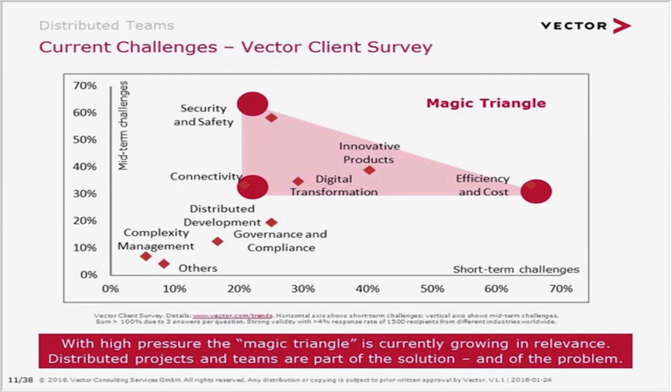Just to give you one number, which I think makes a lot of sense if we think about efficiency, is that typically a distributed team, which is on about 2 to 3 sites, has about 30% of additional cost, which is typically not visible. If it is visible, that's mostly in situations just before such a project crash. But there's overhead, and we should not close our eyes in front of that.